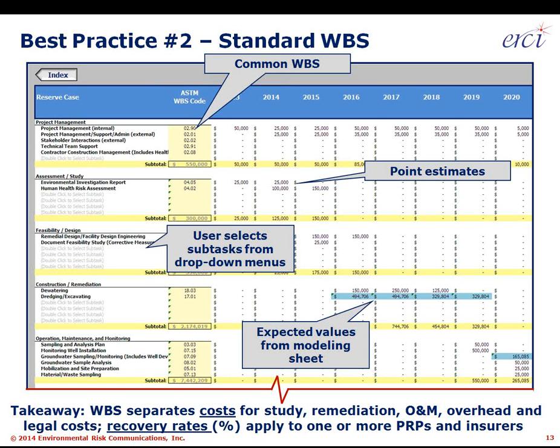Standard Work Breakdown Structure, which means every site needs to go through the same work breakdown structure so that the project team has the sense that they're looking at every liability in a similar way. Far too often, we've seen that environmental consultants have been charged with generating an environmental cost estimate. They generate one from scratch in Excel and then convey it to the client, who then has a unique spreadsheet.